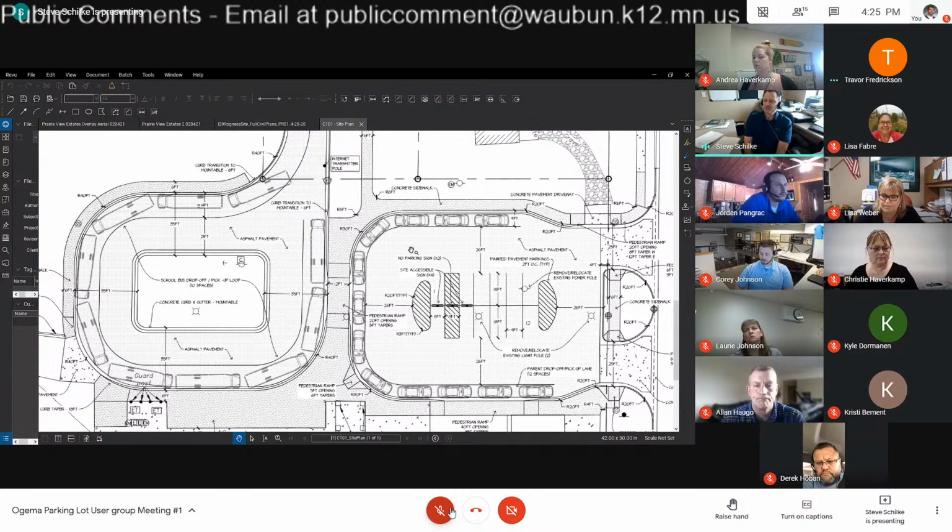In this case, Corey ran through the calcs, and it appears that we're going to be well below that 1 acre threshold. So we shouldn't need to provide any permanent water quality ponds on site. Okay, thank you. Is that even when we finish out Mary Vasika's portion where the house is, we would still meet those numbers? Yeah, we'll have to take a closer look at that.